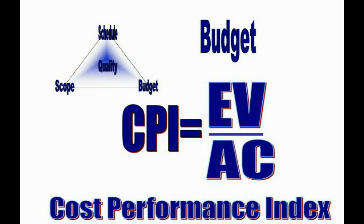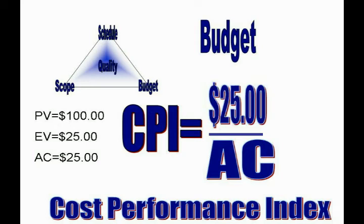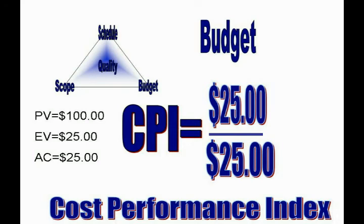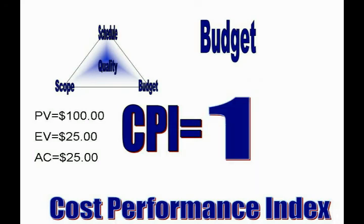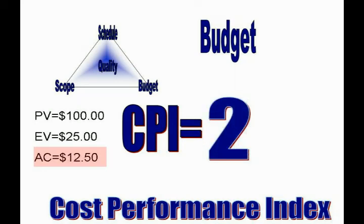The cost performance index, or CPI, is calculated by dividing earned value by actual cost. In our example, we've incurred $25 of cost to produce $25 of value, so our CPI is 1. If it had taken our engineer an hour to unbox the server, our CPI would be 0.5, indicating we had spent 2 times the cost per value unit. If it had taken 15 minutes, our actual cost would be $12.50 for $25 of value, giving a CPI of 2.